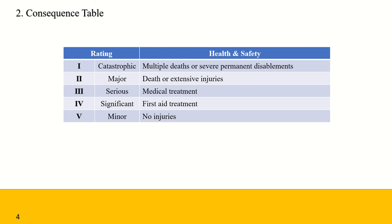Risk assessment is the overall process of risk analysis and risk evaluation. It aims at developing aggregate priorities for the identified risks. Risk analysis is the systematic use of available information to determine how often a specified event may occur and the magnitude of its consequences. Risk evaluation is the process of comparing the estimated risk against given risk criteria to determine the significance of the risk. The assessment process determines the consequence of each risk, assesses the likelihood of those consequences occurring, converts the consequence and likelihood rating to an initial priority for the risk, and develops aggregate risk priorities.